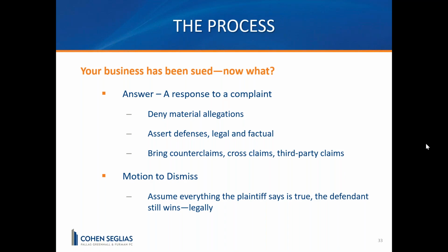It's not required, but here you have to file a denial of any of the allegations, and you have to assert any defenses that you have. And with respect to certain defenses, if you don't raise them in your answer, they actually can be waived. And with respect to other parties that might have some liability for the claims that are being alleged in the complaint, you have the opportunity to bring cross claims, third-party claims, and if you also have claims against the filing party, you can bring counterclaims against them.